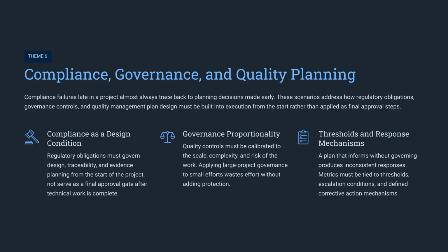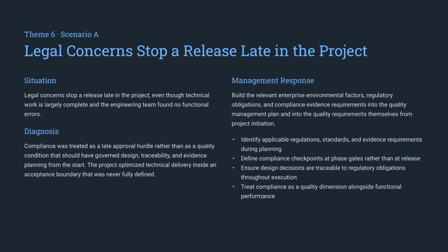Regulatory obligations and quality controls must be built into the project execution from the start, rather than applied as final approval gates. In this scenario, legal concerns stop a release late in the project. The diagnosis is that compliance was treated as an afterthought. To manage this, build regulatory obligations into your quality management plan from initiation, using phase gate checkpoints to ensure traceability